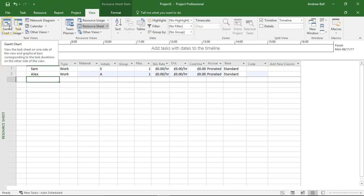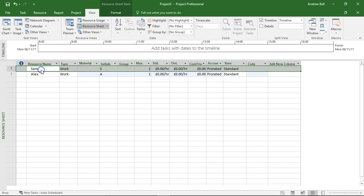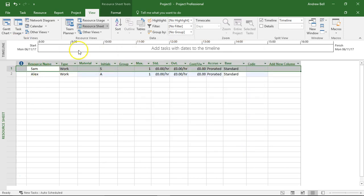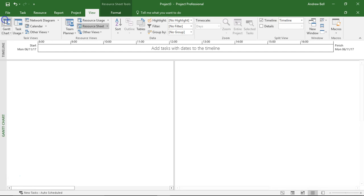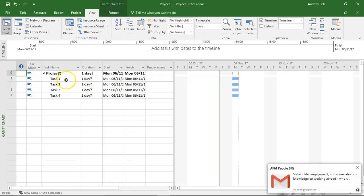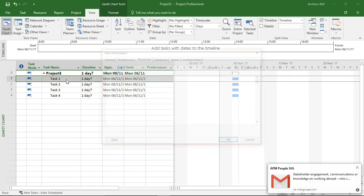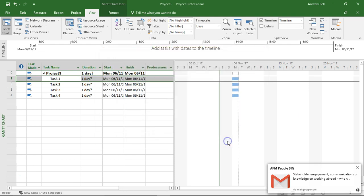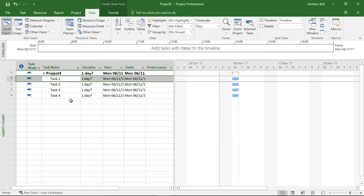So most people are aware that if we double click a resource we will get resource information and on the Gantt chart if we double click a task we're going to get task information. What we need to look at though for work contours is assignment information.